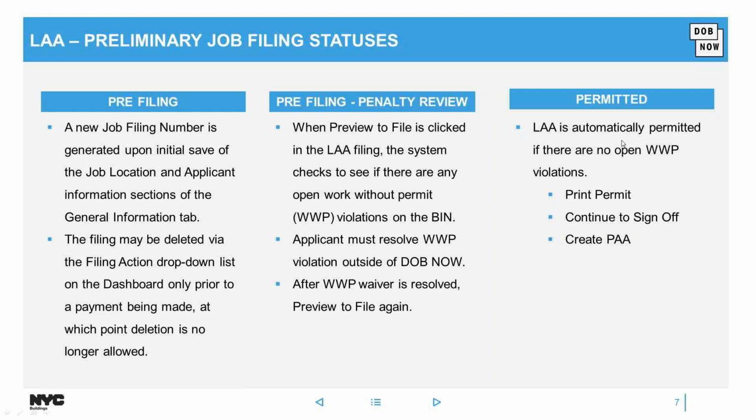Once the inspection has been completed and signed off, and that information is updated in DOB NOW: Inspections and then passed back to DOB NOW: Build, which will happen within a day, then the status will update to signed off in DOB NOW: Build as well.